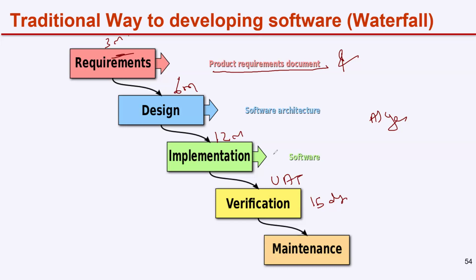At this stage, they're not asking us to have a look into the product and tell them if we have any new requirements. What they're asking us is to check the requirements we gave 18 months back, and whether this product is meeting the requirements or not. During this stage, if there are any bugs, any issues, or some of the requirements we gave at the beginning are not met, we can go back to them and give our feedback, these are the bugs.